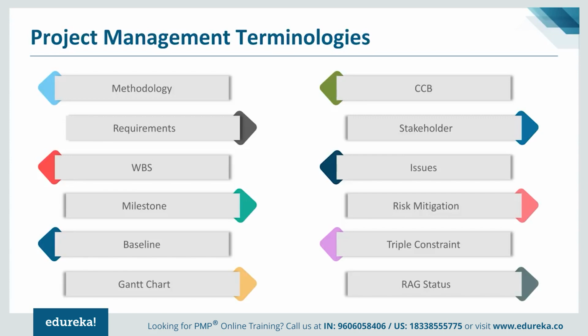So if there is any requirement, we just spoke about requirements. Your project team will spend a good amount of time talking to the stakeholders. They will use various techniques to gather requirements. And once all that is done, you will document your requirements, and the document is signed off. You take sign off from your customers. Now, if anything changes after that, then it has to go through a change control process, which is already defined.